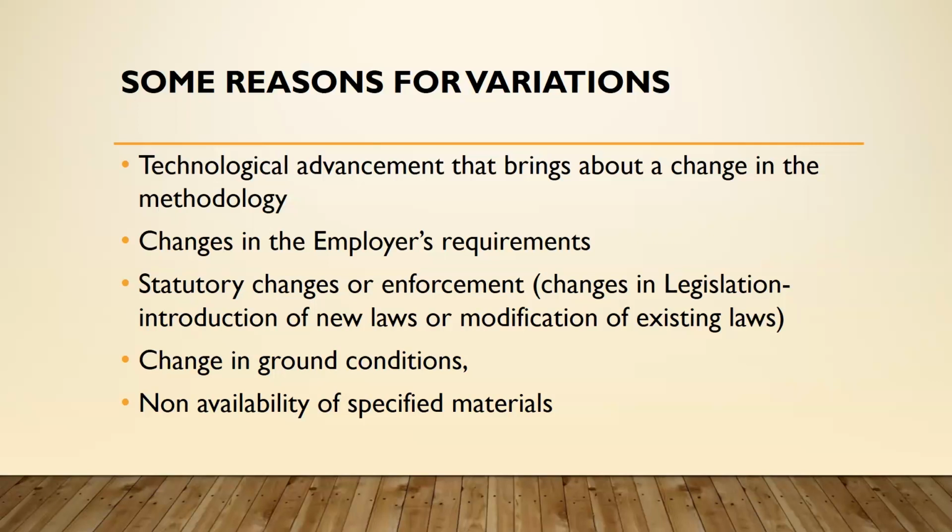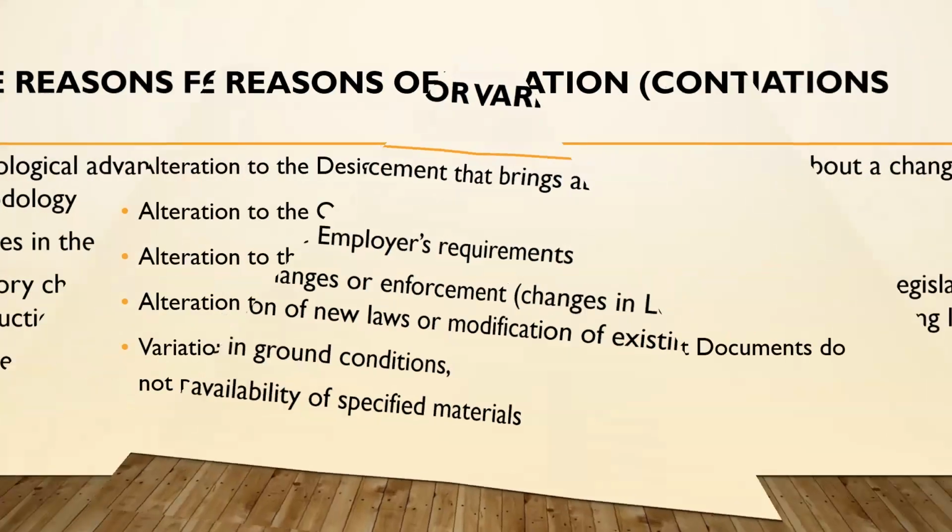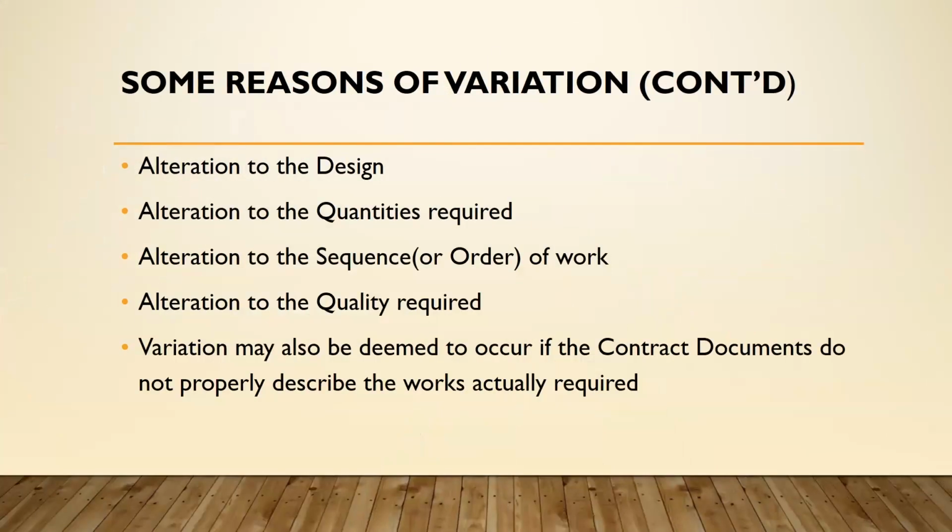Statutory changes and enforcement, where we have introduction of new laws or modification of existing laws, may also bring about some variation to the contract. Changes in ground condition other than the one documented will also bring about variation, and non-availability of specified materials for the project also brings about variation.